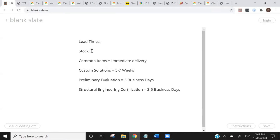So really the lead time is just going to be, assuming the stock is available, the time for delivery from wherever the stock is located to the project site or your warehouse. For custom solutions, that takes a little bit longer — it's a customized type item that comes up from time to time on commercial projects. The lead time for those is generally around five to seven weeks: the time it takes to manufacture in China, load onto a ship, and bring it out to Australia. It can be a little bit longer depending on the time of year.